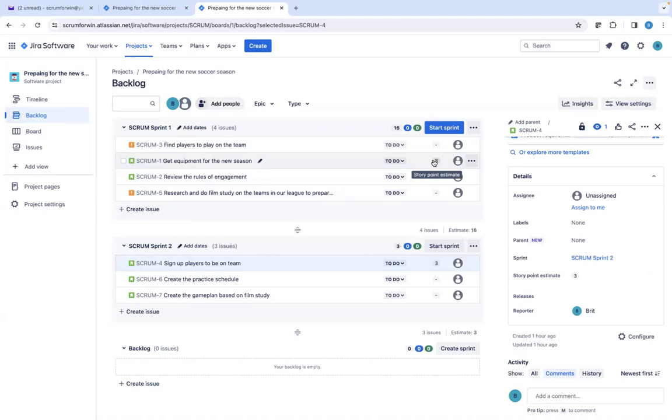So it could either be a 5-point card, or 2 2-point cards, or one 2-point, one 1-point, one 3-point. I hope you get the scenarios. But long story short, you want to understand, based upon what's going on in your teams, how many points your team can digest in one sprint.